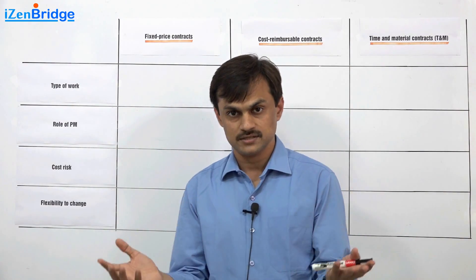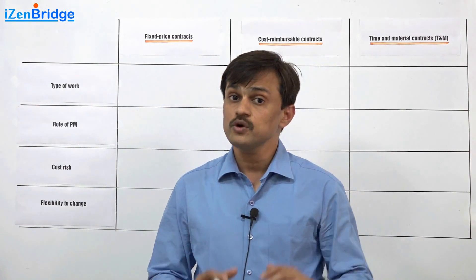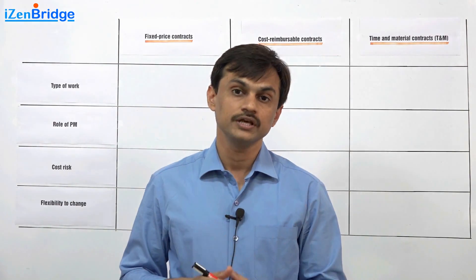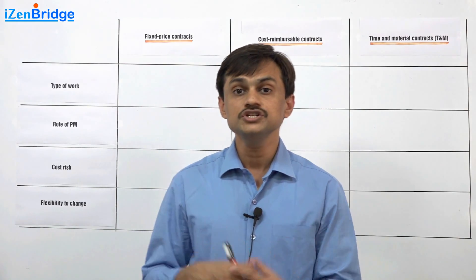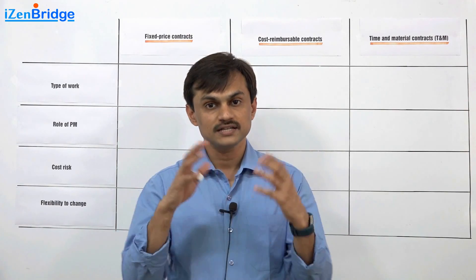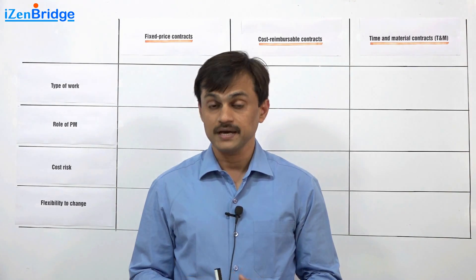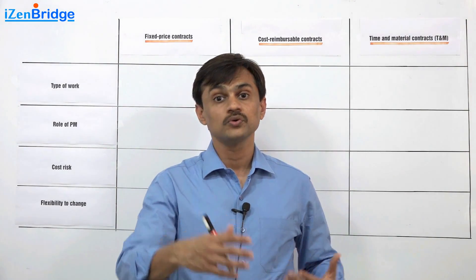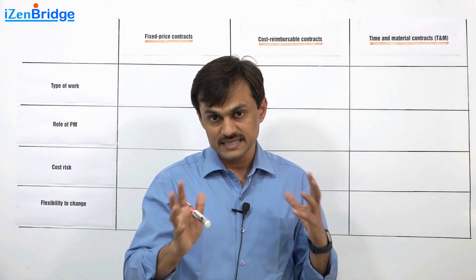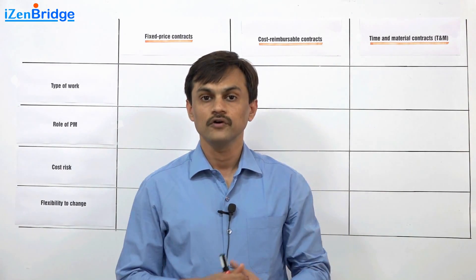Examples I spoke about: flats, holiday packages. In software development, many times when you have ready-made software that just requires implementation and installation at your place, usually they go for a fixed price. In engineering, when you have been creating substations for a while and another utility also wants a substation, you have specifications related to it, you go for a fixed price. Construction of a road: you have historical data, it is not the first time you are doing, you can calculate with decent accuracy the amount of money and time it is going to take, you go for a fixed price.